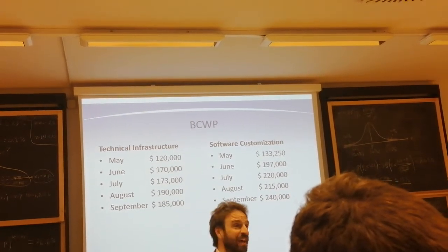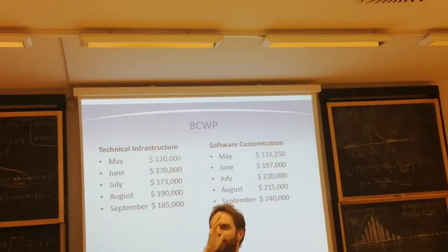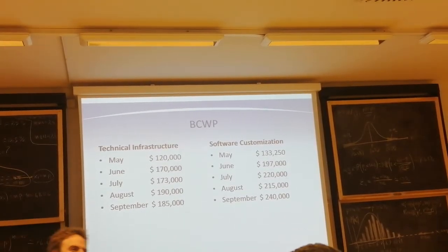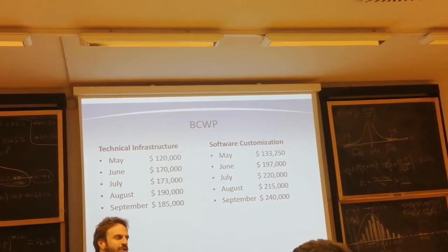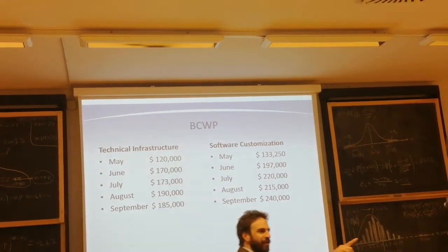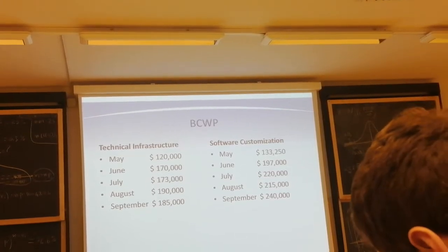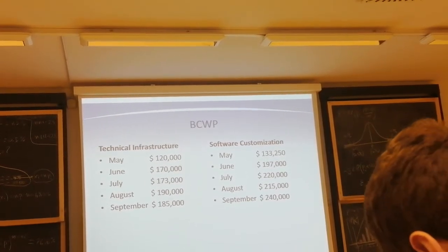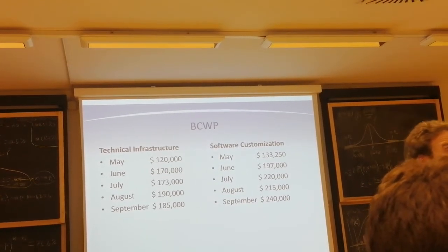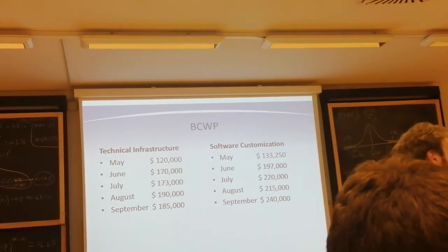You understand the meaning of this acronym in your mind? What's the notion? What's behind the idea? What is the idea of the BCWP? It's the budgeted cost of what we have actually done, which means that it compares what we did, but by considering the unit cost scheduled or budgeted. It could happen that programmers and systemists are more or less expensive than what was expected at the budget phase.